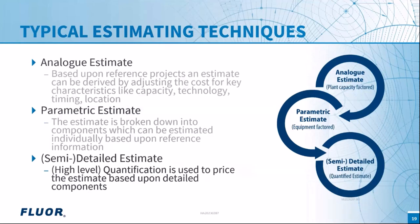The third method is the semi-detailed or detailed estimate, where we quantify everything and apply a unit rate against all quantities. Multiplying quantities times the unit rate and summing gives the overall cost. This brings in much more detail and connects more directly to design deliverables, but it takes considerably more time compared to the analog estimate.